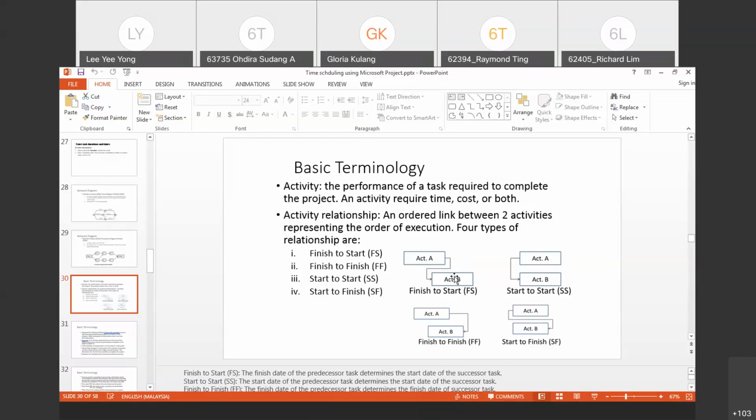Or, okay, the formwork can be done together with the reinforcement. It means that you have allocated enough resources, that is, your manpower. So these two activities can be carried on together. This person does the reinforcement, another person does the formwork. Once they have finished, then there will be activity three, maybe the placing of the reinforcement or casting the concrete.